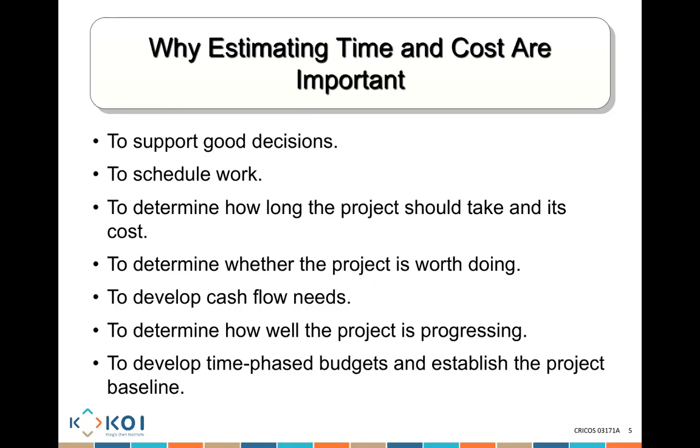After I estimate the cost and start working on a project, it helps me determine how well the project is progressing. Is it progressing well from a cost perspective, or am I over budget? Is it progressing well in terms of time, or am I over schedule? So you compare to what you said. Let's say I say activity 1 needs to be finished by day 5. If I come in day 10 and I check, and activity 1, which was supposed to finish in day 5, is still not finished, I'll know straight away there's something wrong. I can compare what I've planned to the actual performance.